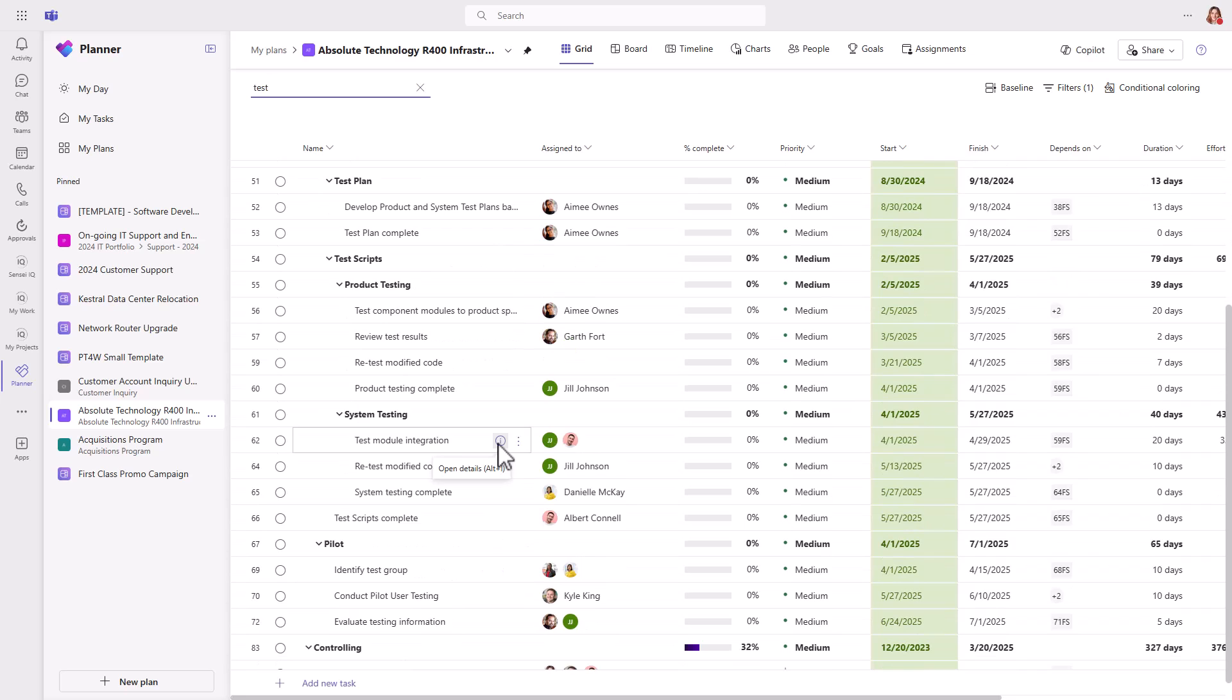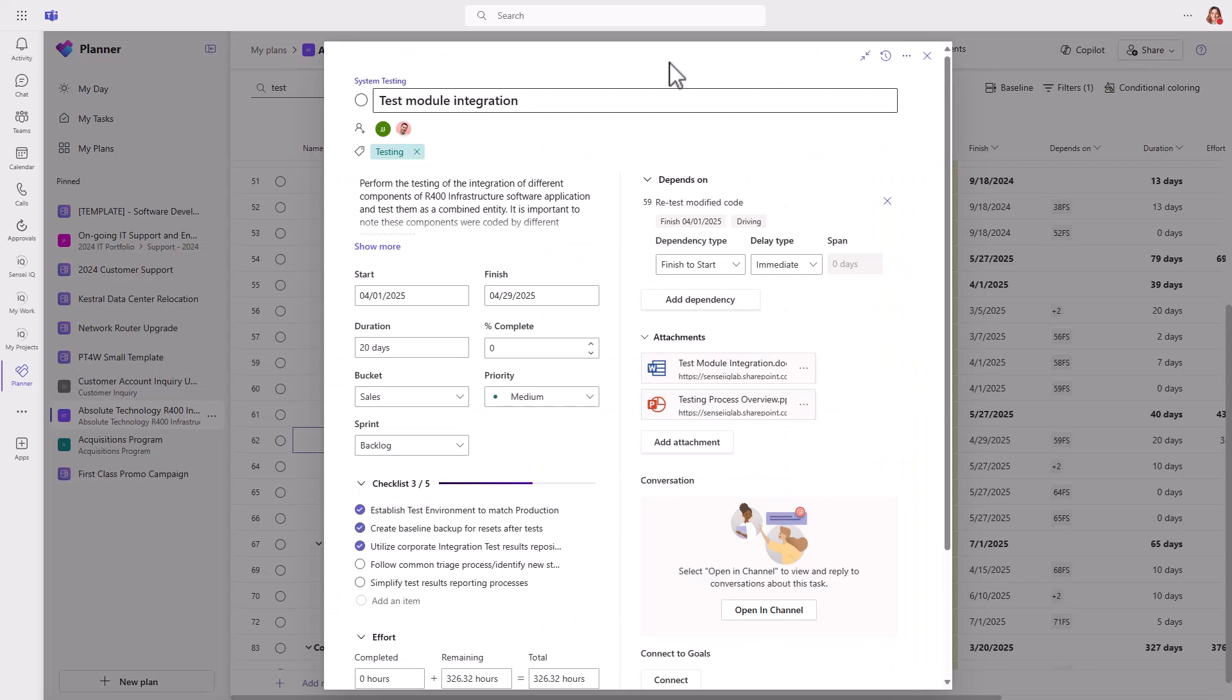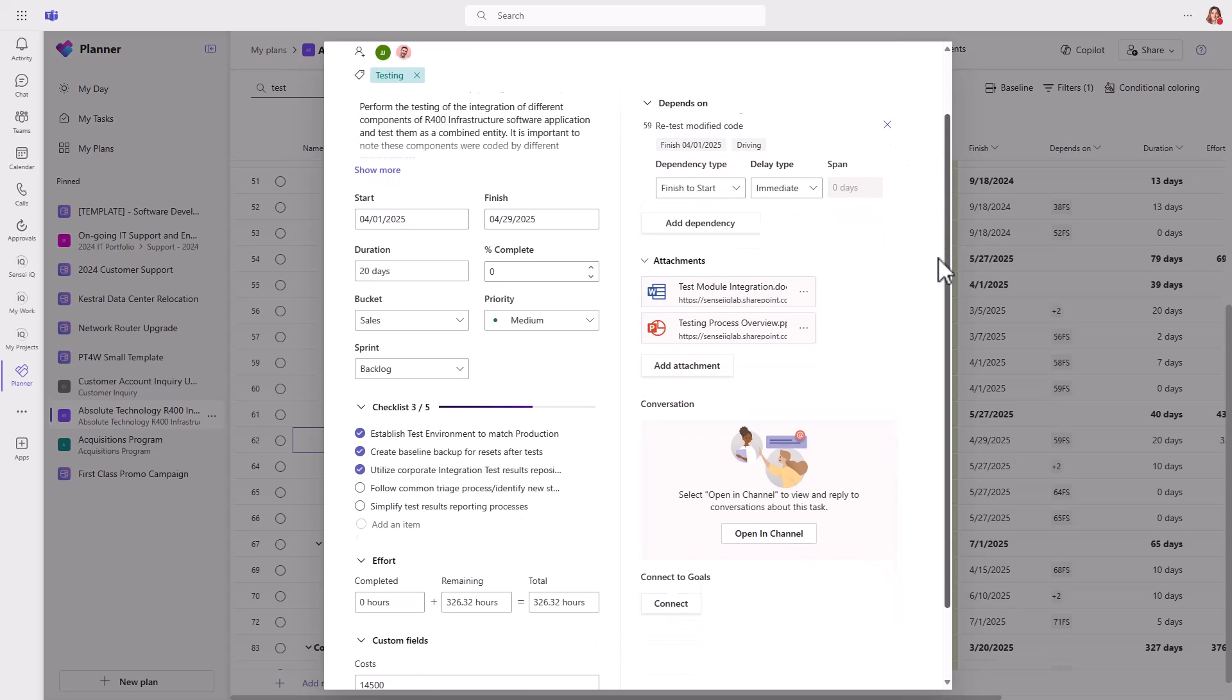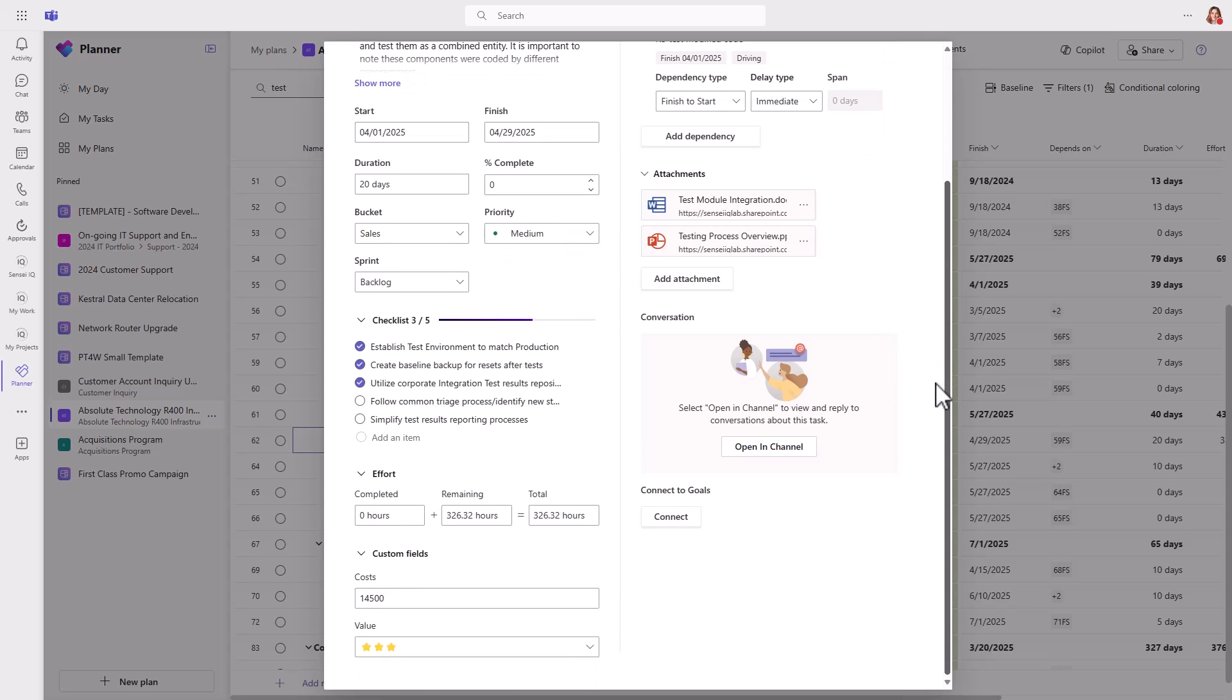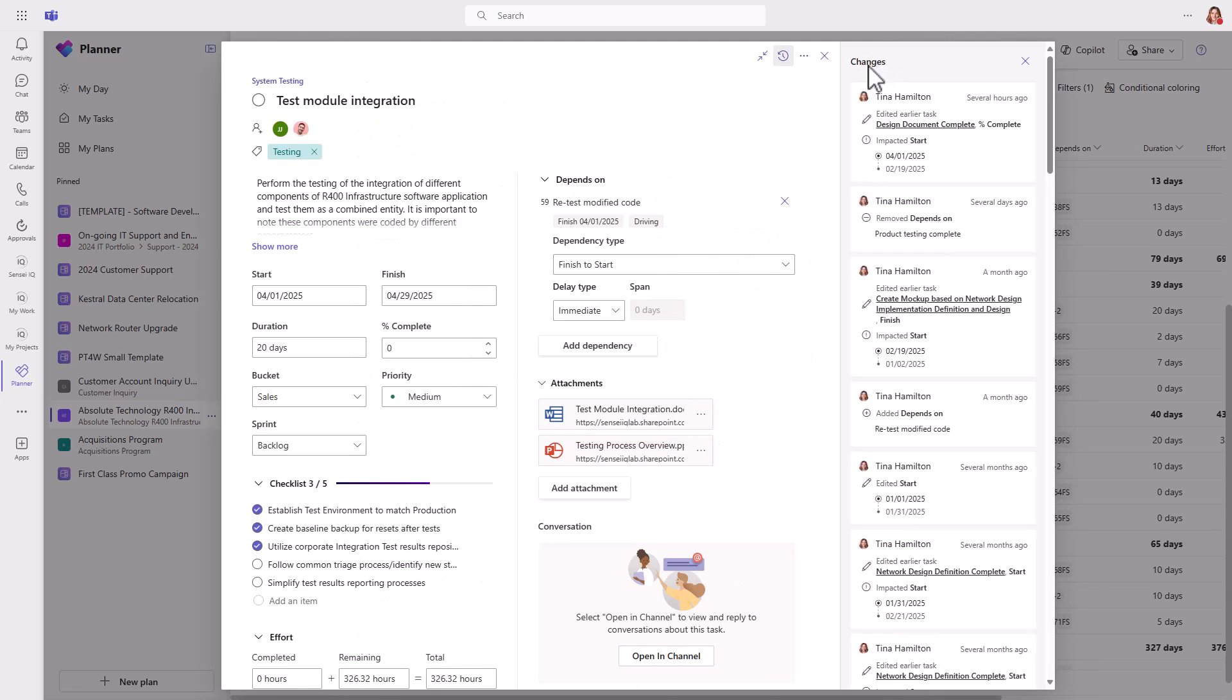At the task level, premium plans offer a more detailed and rich experience with duration, percent complete, sprint functionality, effort, custom fields, advanced dependencies with lead and lag time, as well as task conversations and teams, and the ability to connect tasks to project goals. You even get a complete task history so you can track detailed changes on the task.